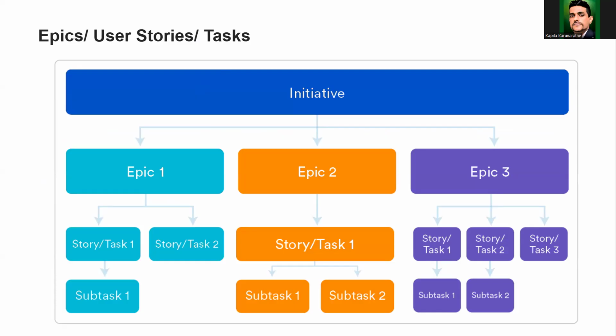If you look at the same topic we discussed, the taxi booking app, that's easy to understand. There will be three or four areas we estimate, like route selection, taxi selection, and payments. Those can be considered epics.